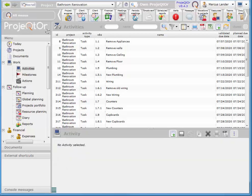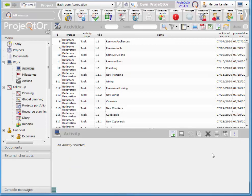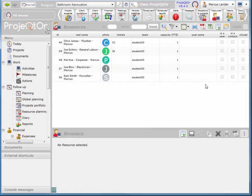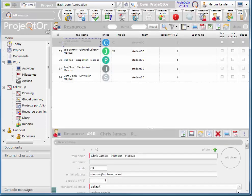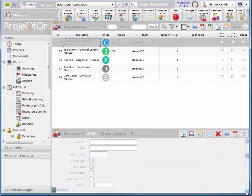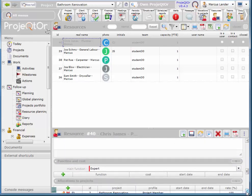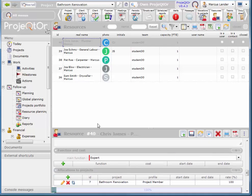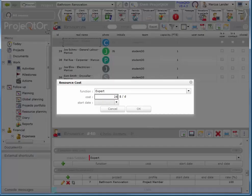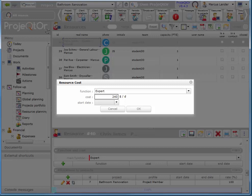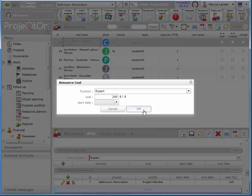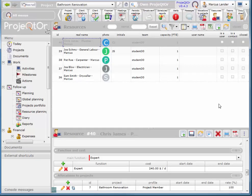So now in order to calculate what that resource costs, we have to add a cost to the resource. So if I go back to resources here, and I choose Chris James Plumber, and I scroll down, you see we have a function and cost area here. So to add his cost, you click on $140 a day. And we'll choose OK.